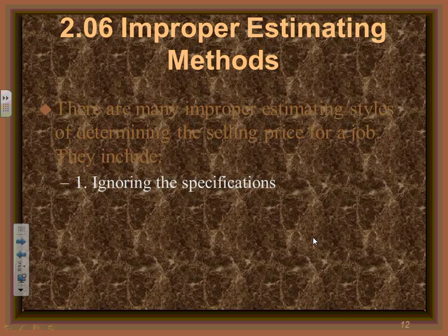Ignoring the specification. You are intimidated by details, Karen, and you really don't want to look at the spec. You guys remember that big spec that I gave you? You're supposed to search these specs, and you know what they do, Derek, at Parsons and Hunt? They take the spec electronically, and electronically they search for certain words, motors, disconnects, electrical words. And not just the electrical, they'll go to the mechanical spec and the structural spec and all these specs, and they search them for electrical words so they can know if there's anything in a mechanical spec that they should be aware of, and they are not.